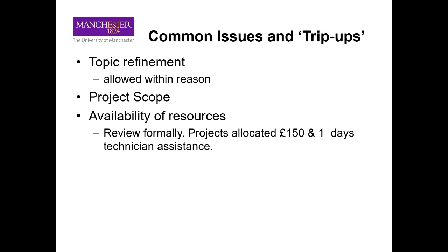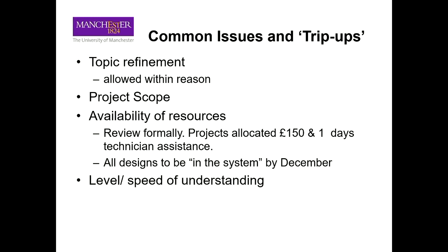If there's a key piece of equipment you need to buy to finish your project, and you place the order middle of semester two, you will not get it in time. It takes more time than you think to get things delivered and collected. So planning, buying things early. All the purchases should be in the system by December.